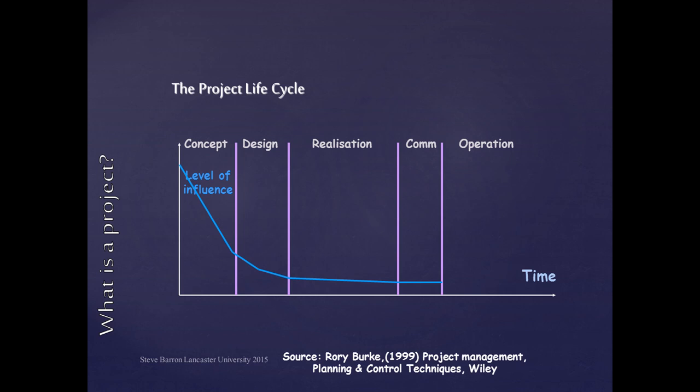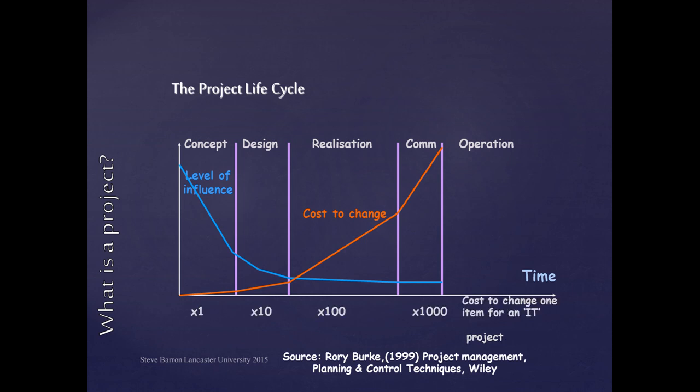In relation to the decreasing ability to make changes to a project, the cost of making changes increases significantly as the project progresses. Burke suggests that for a software project these costs can be increased by a factor of 10 as the project proceeds through these phases.